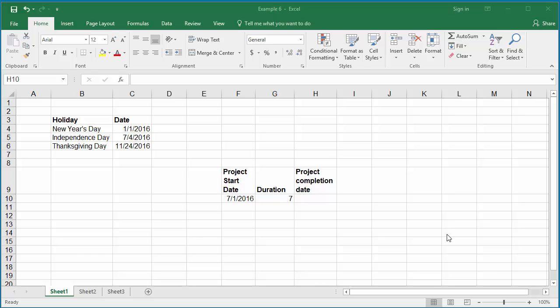If you know the start date for a project and the duration of the project, you can find the end date considering only working days, excluding Saturdays and Sundays.